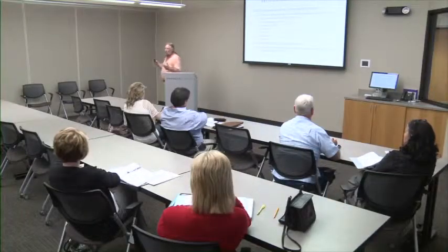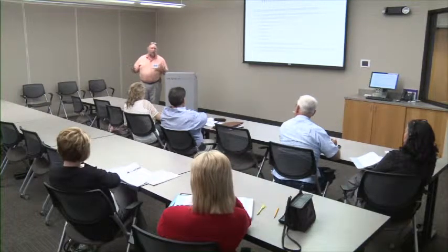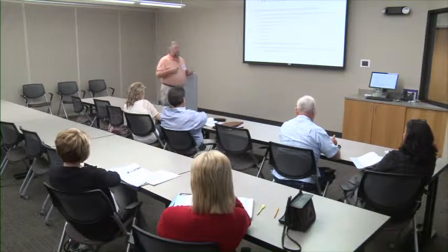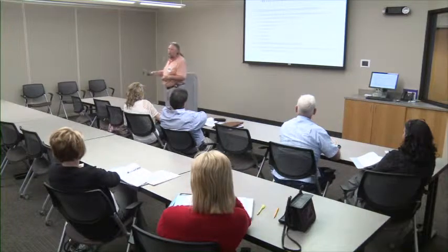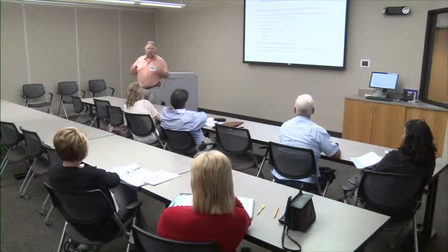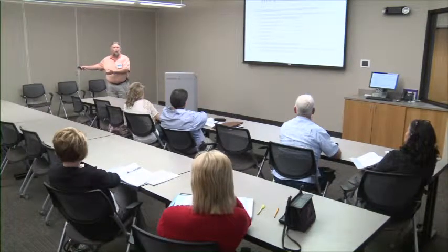Okay? And also, it gives us established production goals. Okay? How we make money in the projects we do is how well we produce. The faster we produce, the better productivity we have, the higher our profit margins are going to be. All right? So if we can do something that we thought was going to take 3 days and we had it scheduled for 3 days and we can do it in 2 days, that means that on that third day I can actually send that group to do something else for me that's production someplace else.